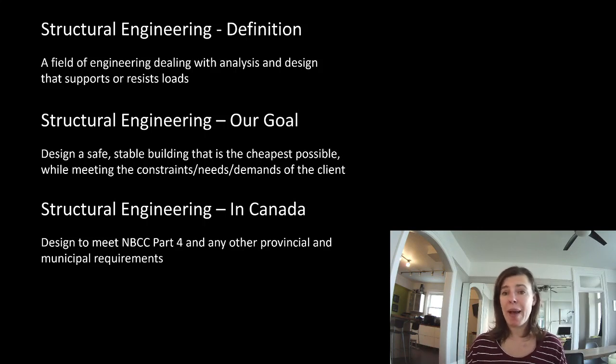For example, climatic data, which is how much snow falls in a particular region, is published in the NBCC. I recently did a project where I looked up the snow load for that region, did all my calculations on it, we submitted for permit, and the building department called me and they said, oh, you didn't know that in this one spot, in this one region, we have a specialty snow load. So you have to go back and redo everything because, and it's not really, you'd have to go on the website.